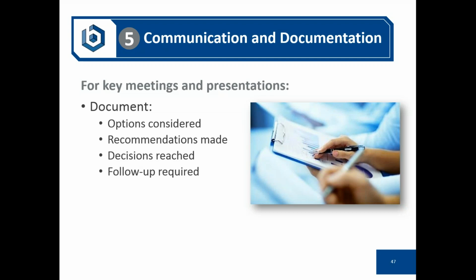I think you want to capture the options considered, recommendations made, and decisions reached, as well as the follow-up that's going to be required by various parties. As an example, your engineer might be proposing 3 different gradations of temperature control system. System A, which is the best and most energy efficient, achieves your LEED ratings. Option B is probably okay, but with diminished comfort for the occupants, and then option C basically meets code minimum